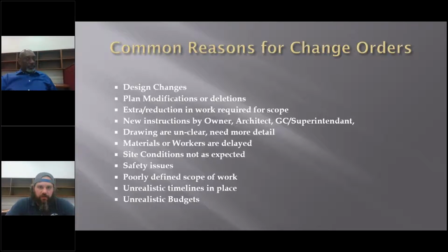Any new instructions by the owner, architect, or a general contractor or superintendent. For me, I've even had it with trash cleanup and just helping a general contractor out that just requests, whether it's a forklift that we have under our subcontract deal, or when anybody needs a little bit of extra work done. Sometimes we have an hourly time and material change order that's associated with that.